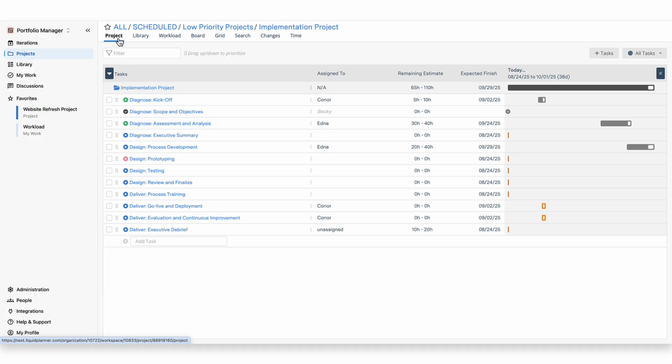As we discussed earlier, adding ranged estimates and assignments to your tasks really helps the predictive scheduling engine to forecast accurate project dates. However, manually adding target dates to your items helps you get even more out of the predictive scheduling engine. While the expected start and finish dates are calculated and fluidly adapt to change, target dates are added manually and are fixed.